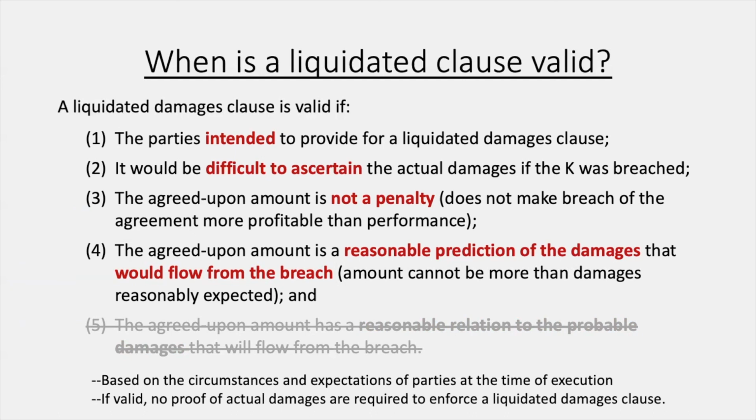So even if you had no actual damages, you can still enforce a valid liquidated damages clause to collect. And this is why we look at them with such scrutiny, because if there's no actual damage, there could be a significant windfall. On the flip side, it might also not compensate the plaintiff fully for the actual harm and give the defendant pretty much a free card for breaching the contract. So we want to make sure that, again, it's a reasonable prediction of the damages, but also not a penalty, to balance that compensating the plaintiff, but not punishing or causing a windfall.